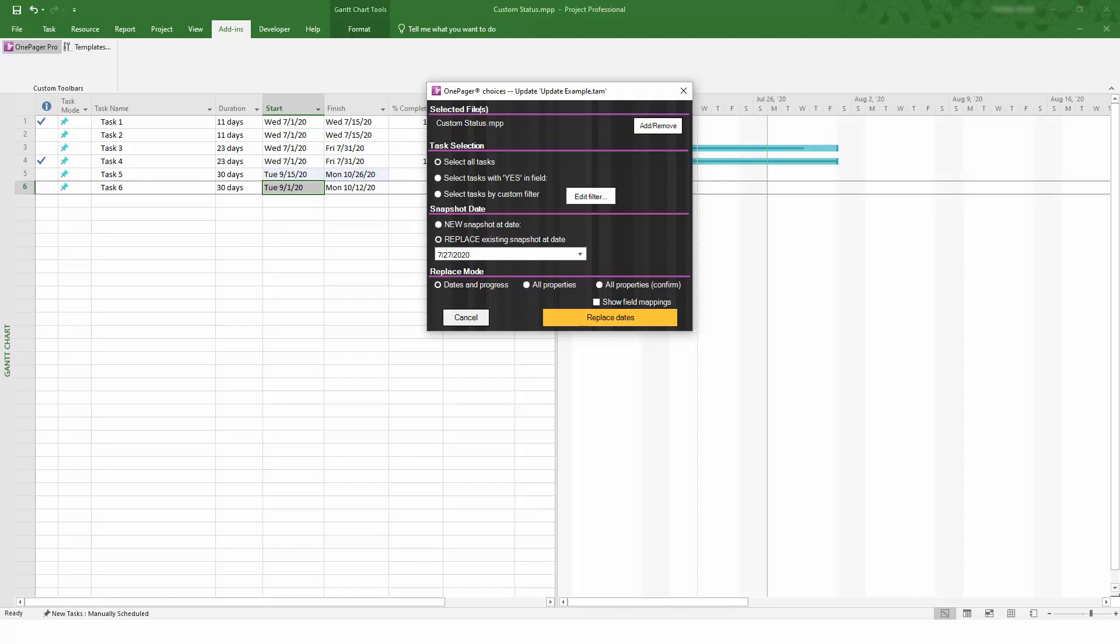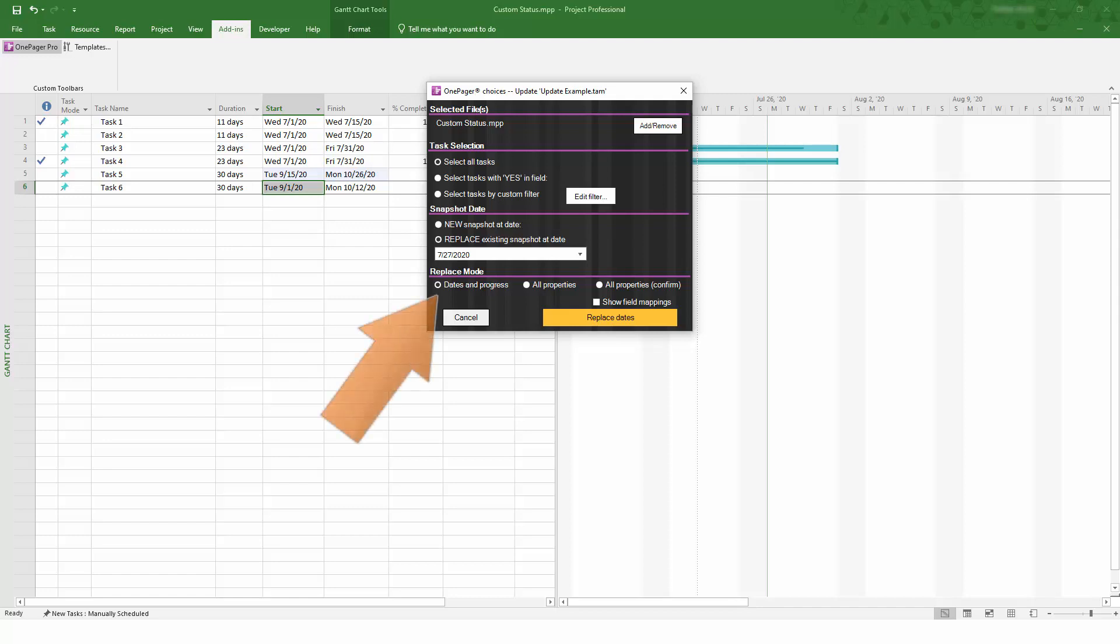There are three Replace modes: Dates in Progress, All Properties, and All Properties Confirm. The difference between Dates in Progress and the All Properties option is that Dates in Progress is designed to only refresh a subset of the fields from your source file, like Start and Finish Dates, Status, Critical Path, and Percent Complete, things that are naturally going to change from one update to the next.